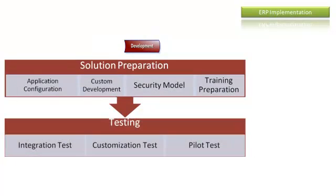In the Development phase, it's time to execute — configuring the application according to the design output of the previous phase, and developing the customized solution and modifications. Security models are executed and training sessions are prepared for key users and end users. Testing is performed for both internal and external integration as unit tests, and customization is tested from both functional and technical points of view, fixing bugs and errors.